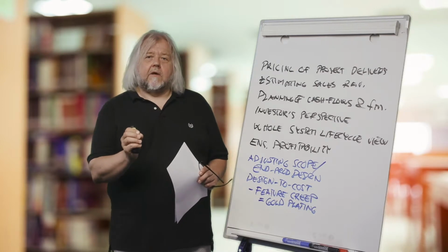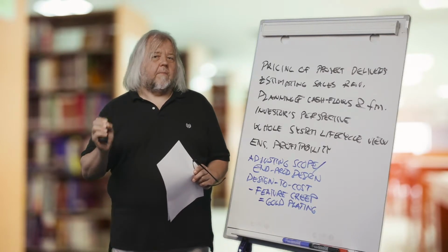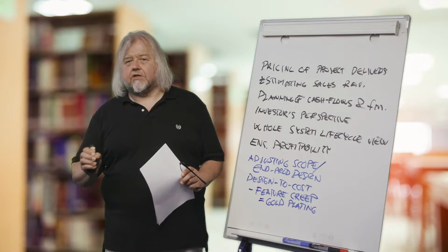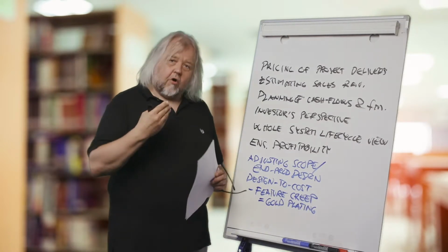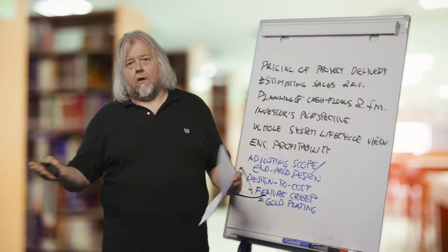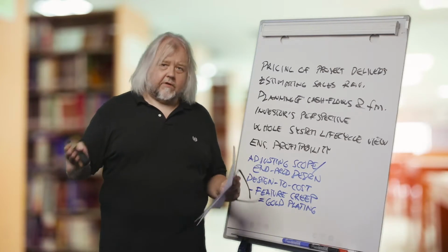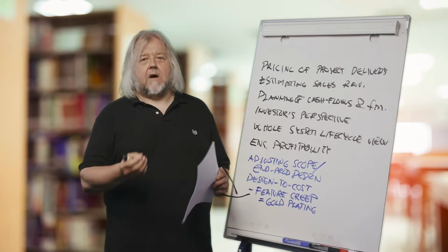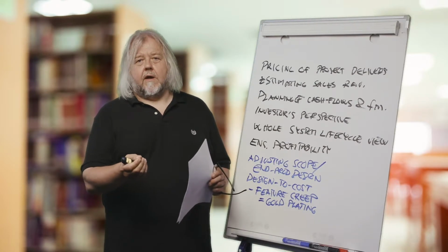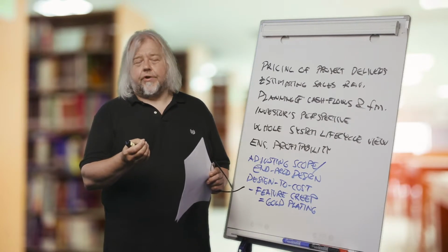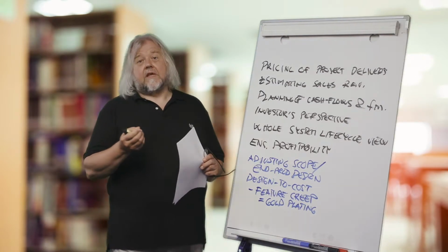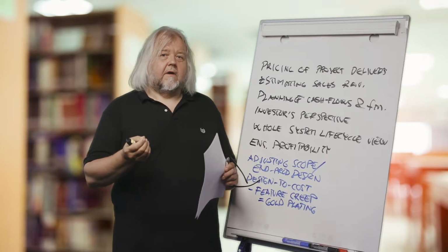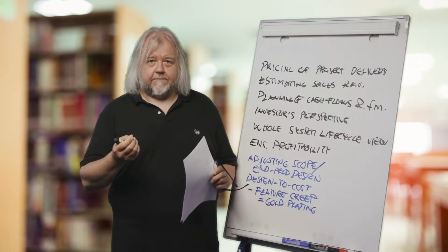We are making so many important commitments, contracts, decisions in the very beginning of the project. For example, we are ordering the main equipment that have a long manufacturing time, and they are in the critical path, and that's why we must order them and make juridical contracts where we are committed to have those purchases.